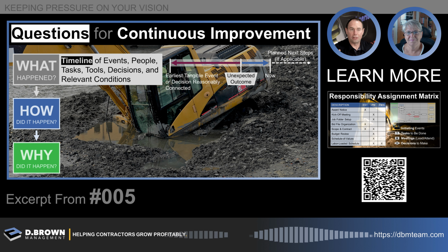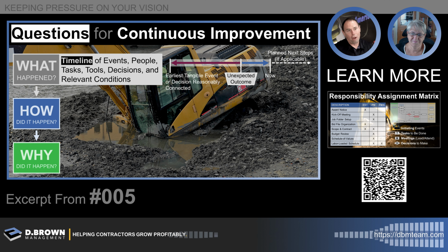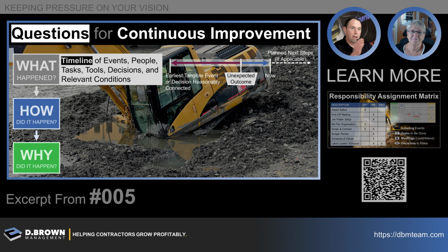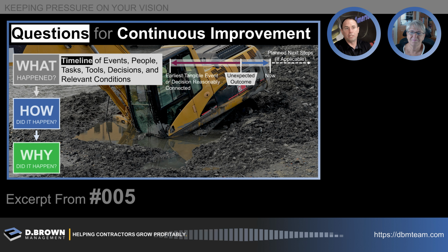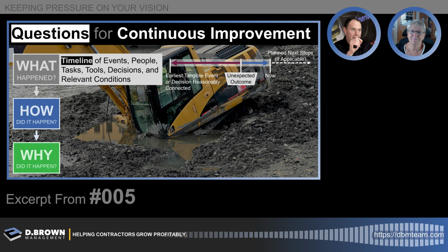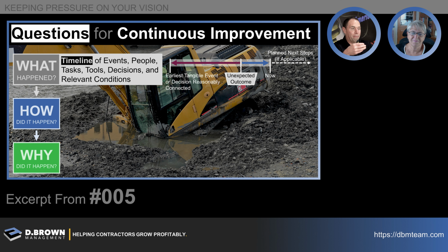There was nothing else that went wrong. There's no reason to keep going at that point. We had the problem. Okay, cool. We know what we had to do to go fix it. But we also know what went wrong: we just didn't disseminate the change in the standards, and we were just trying to level out workload between crews. And it was just a failure. Both crews had very clear work plans on what they were supposed to do. We literally moved a bullet point from one to the other to level workflow, and we forgot to tell somebody.